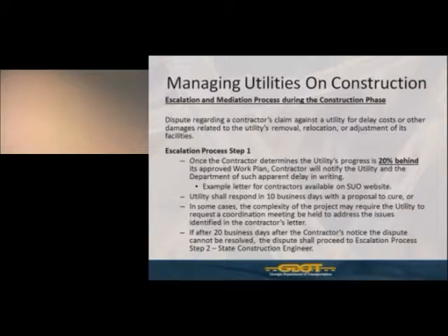what's going to happen under this third step of the escalation process, or third potential issue to create an escalation process, is the contractor and his WUCs must document the utility relocation work on a project. Part of that documentation requires his utility coordination meetings, discussions that are going on with the various utility owners, and managing their relocation work in relation to the contractor's roadway construction work.